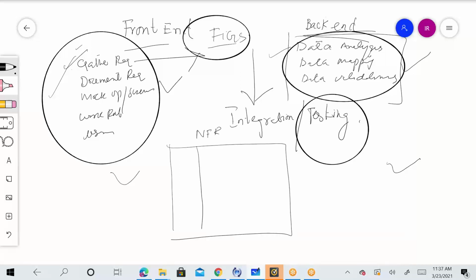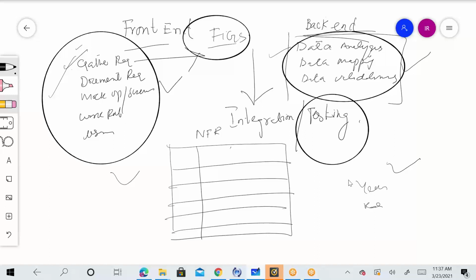So when I joined the project, my project manager showed me a list of all the non-functional requirements Barclays implemented throughout different solutions. I already mentioned last lecture that certain non-functional requirements were highlighted as yellow, certain were red, meaning they were no longer being implemented, and certain were green. Out of the green, there were 20-25 green requirements. We selected 12 to 13. My manager said this is what should be, and of course the developer was also sitting there, so we decided that these are the 12 or 13 requirements which must be built within our application.